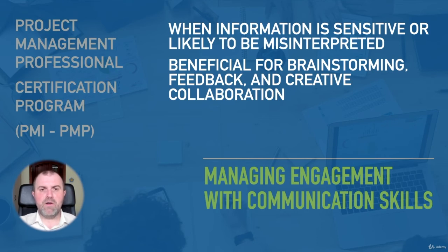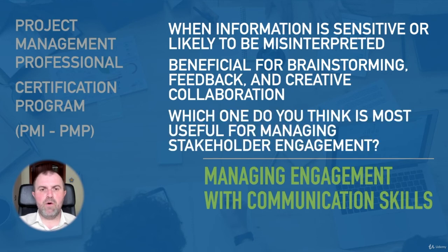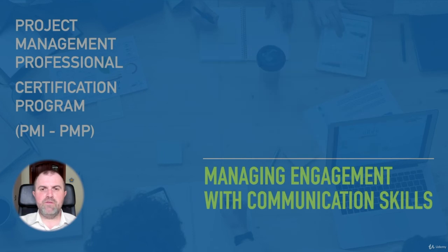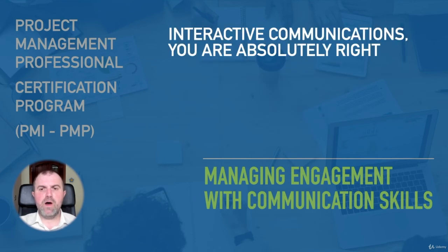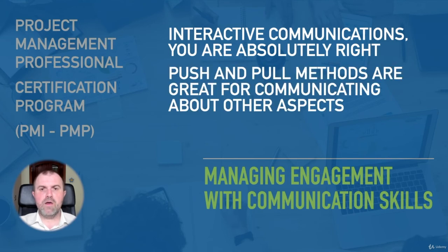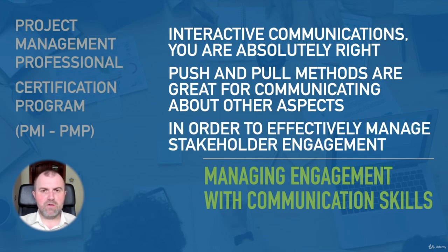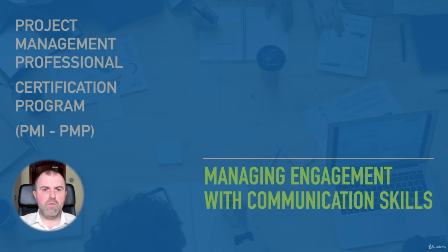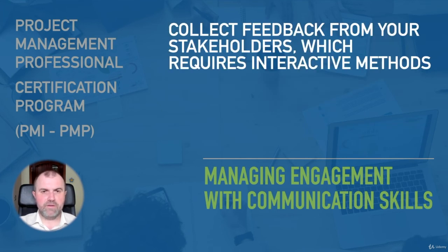So now that you are aware of the types of communication methods, which one do you think is most useful for managing stakeholder engagement? Well, if you said interactive communications, you are absolutely right. While push and pull methods are great for communication about other aspects of your project, in order to effectively manage stakeholder engagement, you need to collect feedback from your stakeholders, which requires interactive methods.